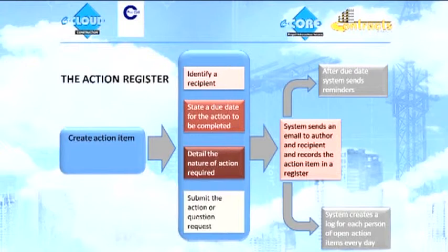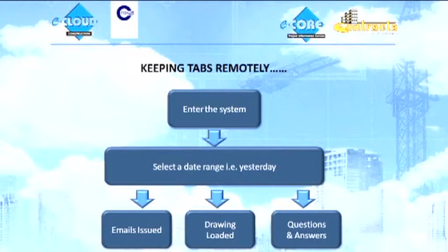So you create an action item. You identify a recipient. You state a due date. You detail the nature of the action required. I want a drawing from you, Mr. Architect. And submit the action to the system. The system then takes over and sends an email to both parties. On the due date, it starts sending out reminders. And in the interim, it compiles a log of every single action that has happened. And it tells you how well you're doing. So I can tell you that on average, you have received 400 action items and you've answered them on average one and a half days after the due date.